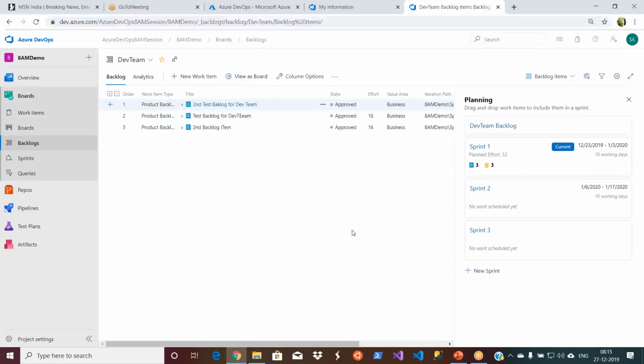Because working is personal, right? You go and work on it, but how do you record it? You come and populate this one. Here you will not have the option that I worked for 2 hours and you worked for 3 hours on the same task. So the tracking will become almost impossible. That's why this is one-to-one. If you want to change it, you can, once you're done. Let us say it is 8 hours of work and you're done, and if you want to assign it to some other person, you can assign it. That is possible, but you cannot have multiple people. That's not suggestible either.